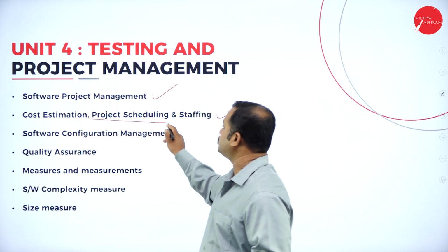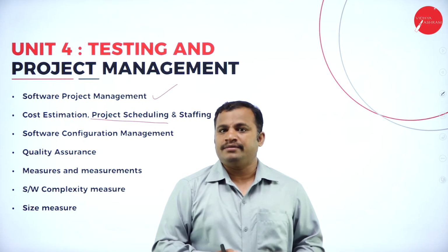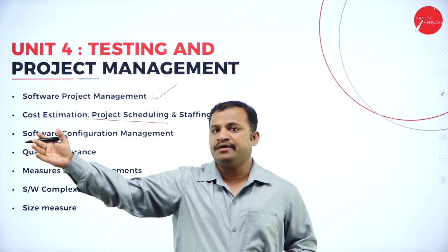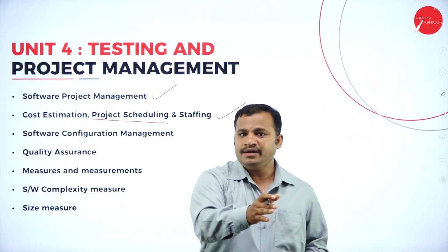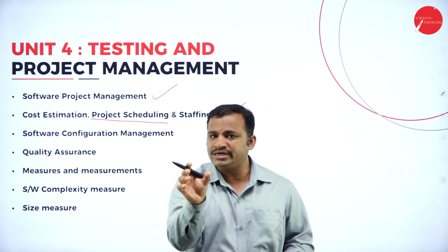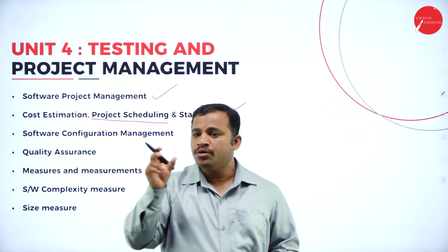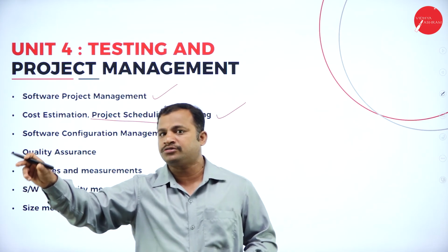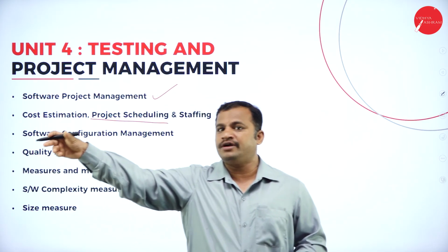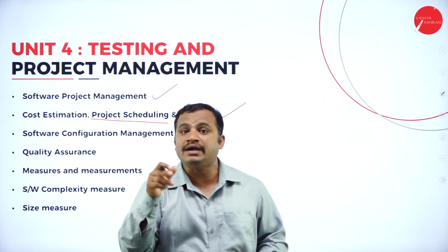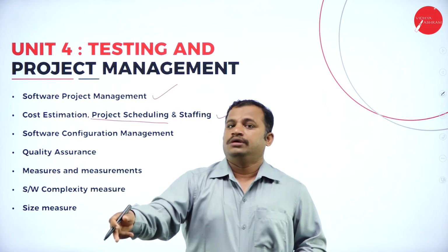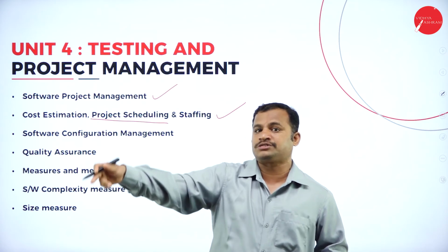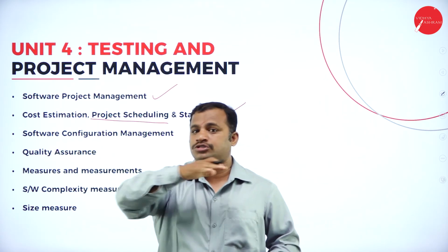Then cost estimation and project scheduling. That means the software requirement is collected today. From today to the next date when it has to be delivered, when the analysis is to be carried out, what is the time span required to carry out the implementation, what is the time span required to carry out the testing, what is the time span required to deliver the software product to the client. Once it is delivered, he may come with a few more changes. Then what is the time required to explain to him the new or modified changes incorporated into it? All those must be calculated in terms of time, also called scheduling.